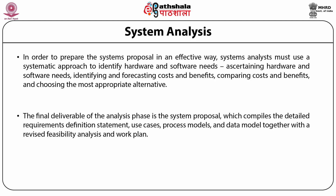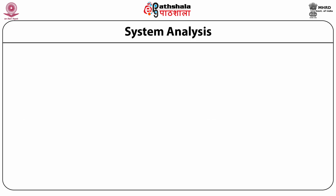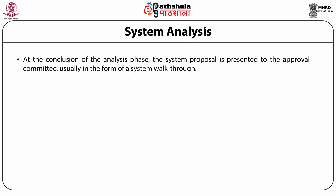The system proposal compiles the detailed requirement definition statement, the use cases, the process models, and the data model, all together with the revised feasibility analysis and the work plan. At the conclusion of the analysis phase, the system proposal is presented to the approval committee, usually in the form of a system walkthrough.